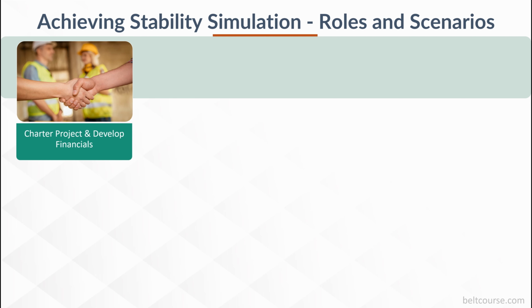you, you would charter a project using the ideal methodology, meaning a DMAIC, Kaizen, A3, or just do it. Part of the exercise would also be to build the financial template to estimate or calculate project savings. This would ideally be led by any improvement leader or project leader. It could also be led by a sponsor or a cost deployment member, so that they can practice the scoping and financial aspects as well.